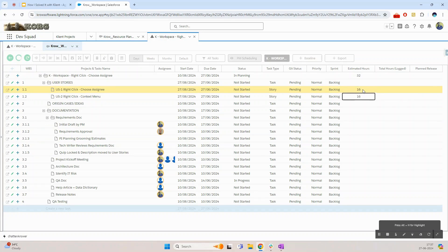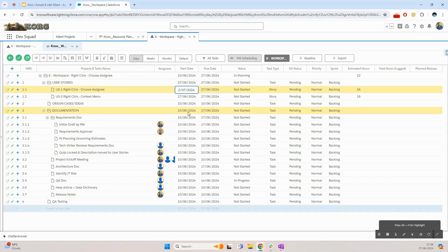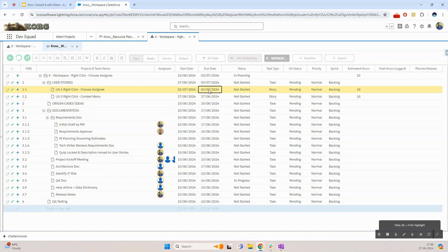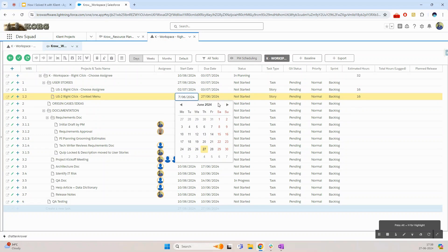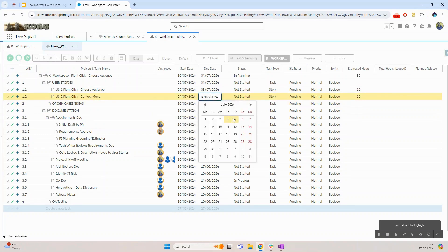So both of these stories will take two days each. That would mean I need to adjust the start and the end date for the story which I can simply do by coming into the start and the due date column. The first story I'm going to plan from 2nd to the 3rd of July and the second story I'm going to plan from 4th to 5th of July.